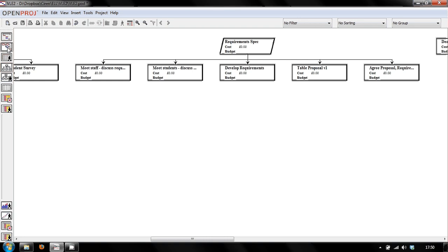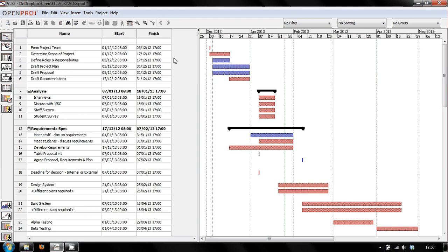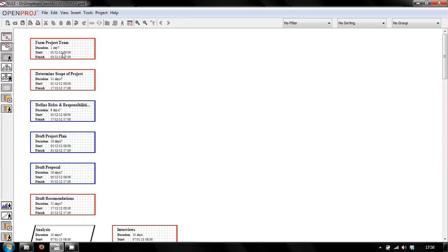Speaking of handy diagrams, if I now go to the second one down, which is a CPA network diagram, critical path analysis, this allows you to specify the order in which you need to do things, and allows you to therefore calculate the critical path. Red tasks, by the way, if you go back to the Gantt chart, the red tasks are part of the critical path, the blue tasks are not, and obviously the way you arrange them here will arrange your critical path overall.